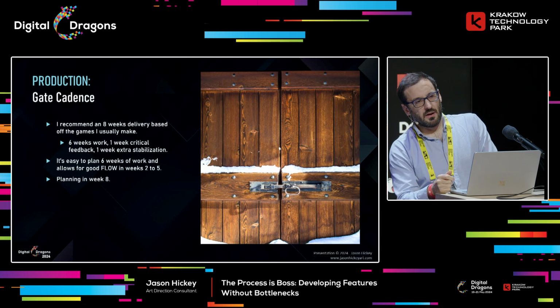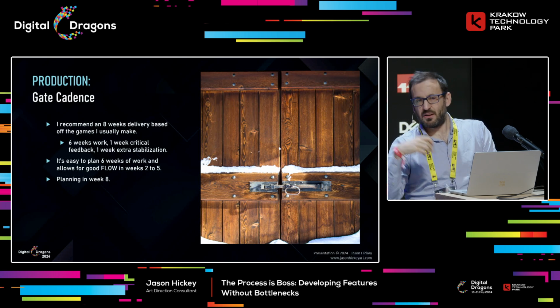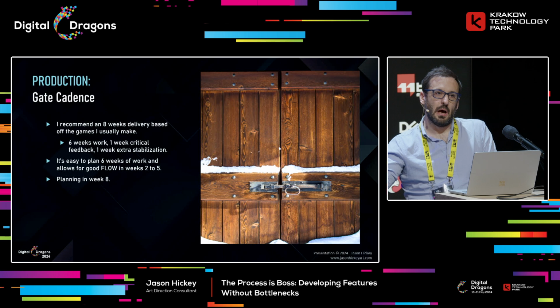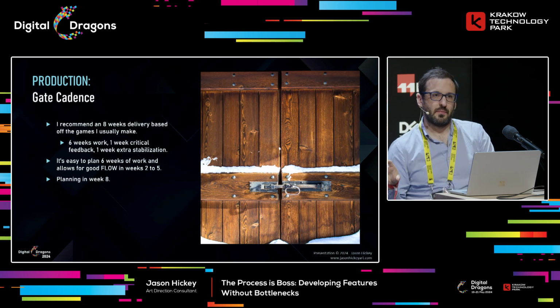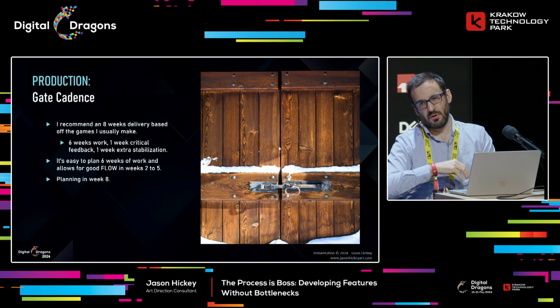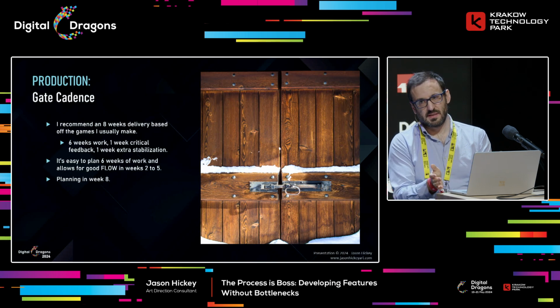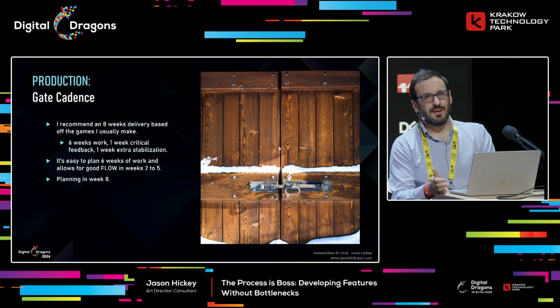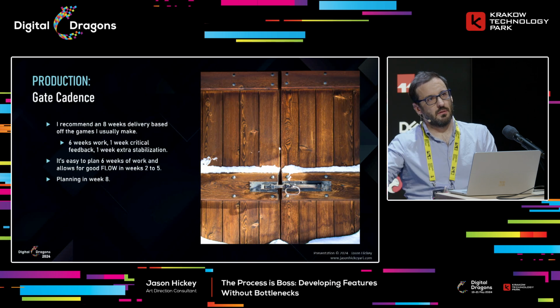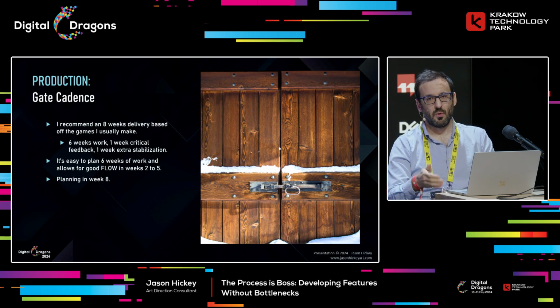What you're looking at there is in week 8, you're planning the next milestone, and that's more the leadership. And in week 1, you're doing all the kickoffs. So you're getting a good flow from week 2 to week 6. And by flow, I mean you're reducing the meeting overhead. You're letting people get the work done because the work has been clearly defined.